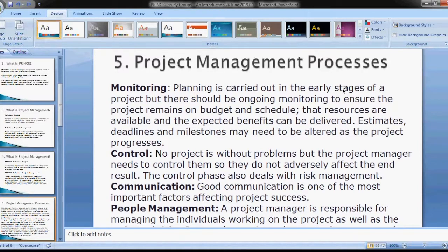And the reason why you need to articulate them or write them down is because at least you're aware of them and you can have some actions in place before you start your project. When you have the action in place, when the problems arise, there will not be a surprise to the organization or to the job or to the task that you have in hand. You will have had a mitigating action to say, okay, for example, I've told Mr. J to be my building contractor. He's going to supply the goods. How are you going to make sure that you get the goods yourself? Are you going to make sure that you have a driver and a van to go and collect it?